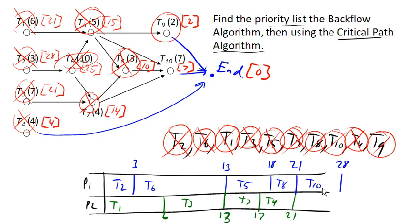And there we go. There's our schedule. And notice that 28 units of time was our critical time. And so this schedule is optimal. There is no way to make this schedule finish any faster than we did.